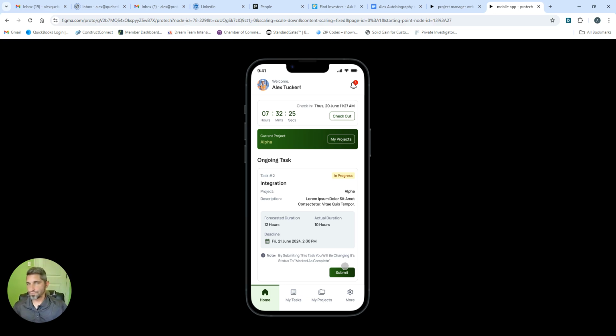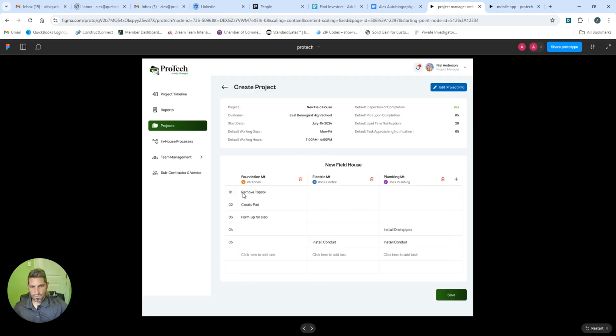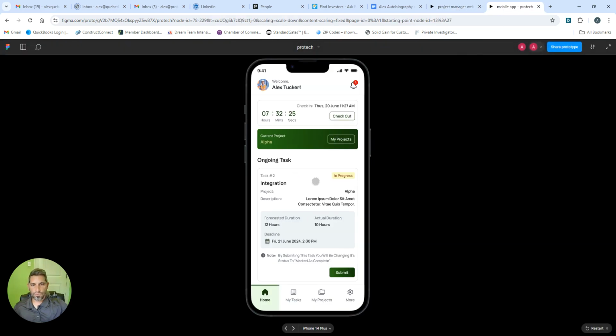And it's not just a single employee, it could be all of the employees. So let's take edge banding, for instance. It might take 2 to 5 people to do that efficiently. All of those 5 people are going to be tasked with that edge banding. All of their time is going to pool in together, and when that task is complete, then you'll have all that data. So that is how these tasks and hierarchies get to the field.